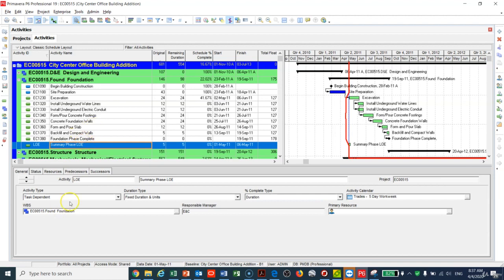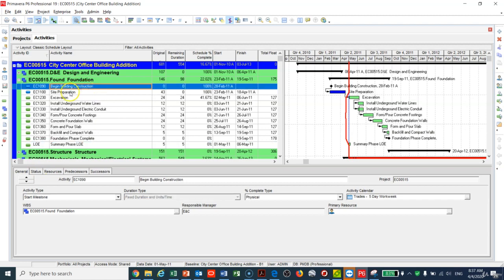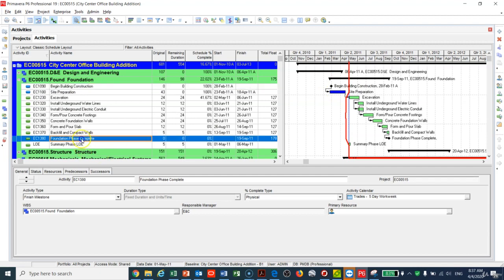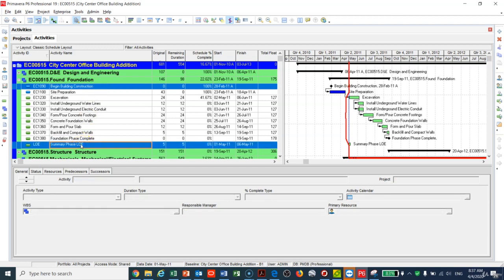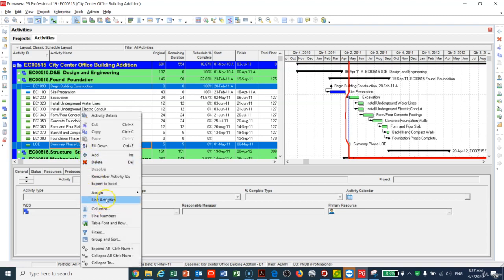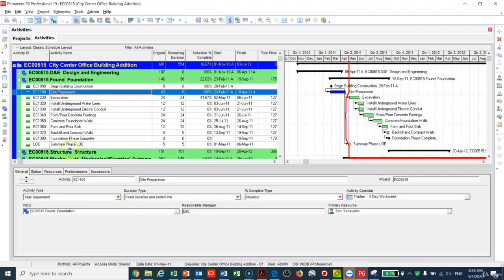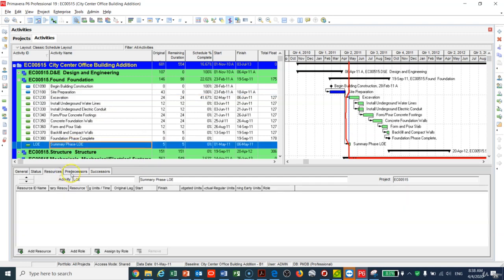I now have the LOE activity — it has a default duration, but I'll tie it to get the proper duration. The first activity in this WBS is Begin Design, which already has actuals, and the last is Foundation Phase Complete. I'll highlight Begin Building Construction, then right-click and select Link Activity. This ties the summary phase LOE to that first activity.